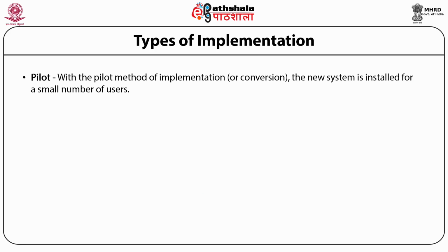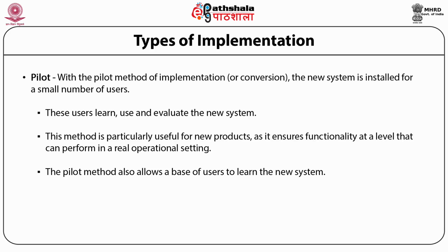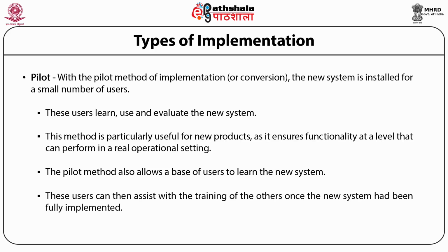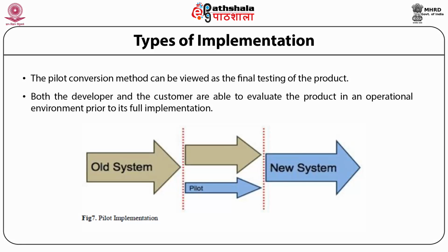Pilot. In the pilot method of implementation or conversion, the new system is installed for a small number of users. When they learn, use and evaluate the new system, and it is deemed to be performing correctly, the system is installed and used by all. Now this method is very useful for new products because it ensures functionality at a level that can perform in a real operational setting. The pilot method also allows a base of users to learn the new system. Users can then assist with the training of the others while the new method is being fully implemented. The pilot conversion method can be viewed as the final testing of the product. Both the developer and the customer are able to evaluate a product in an operational environment prior to the full implementation.